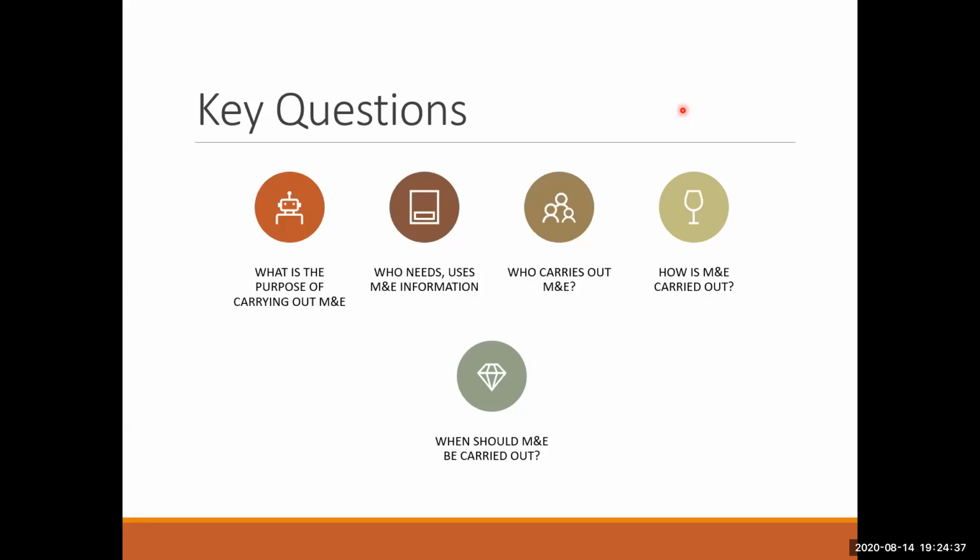So how can I make sure my staff reach the exact target in the timeline or the period that I planned? Let's say I have to distribute 1,000 NFI per month. My project is 6 months, so I will distribute, let's say, 5,000 or 4,000 NFI kits. If there is any delay or risk, or the staff have low performance, it will affect my project, and in the end, it will affect my program.